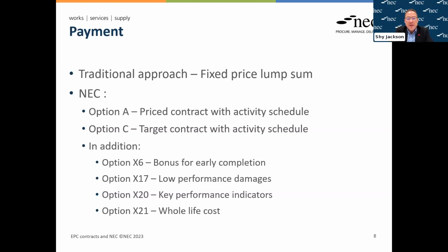And in addition, I tend to think that the way the risk share is structured should be kept relatively simple and that overcomplication should be avoided. And we see sometimes people who create very complex structures based on different levels, different share percentages, depending on how much the cost is exceeded or the savings. And sometimes that creates a bit less clarity as to how payment is being made. So my approach tends to be keep it relatively simple.